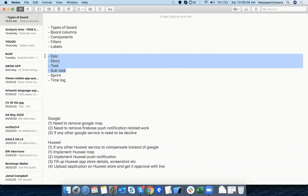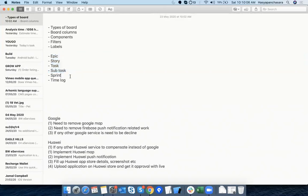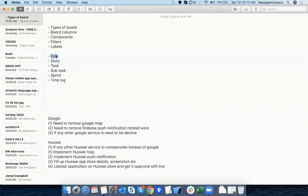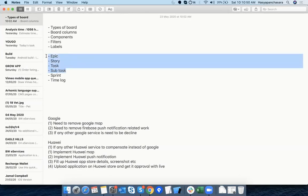The sprint could be any size and will have epics, stories, tasks, and subtasks. For example, consider a user module epic. Stories would be login, registration, forgot password, change password, my profile, and edit profile. Login will have different tasks — normal login, login with biometrics — and each task will have subtasks like UI activity, API activity, functional activity, and validation activity. This is how it flows.